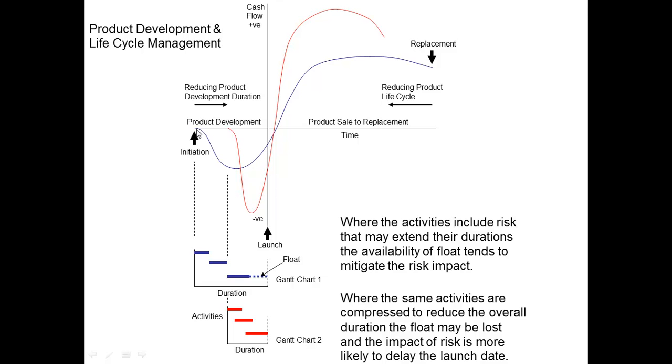Now if we consider the activities that are being undertaken down here, we know what they are. They're design and manufacturing engineering and all those things. That's what's going on over here. And if we take a considerable time to develop new products, then it's likely that some activities will be critical, that is, that they have to be done on time because there's no float or slack, and other activities have spare capacity, spare time at the end, and they can be done sequentially, one after the other.